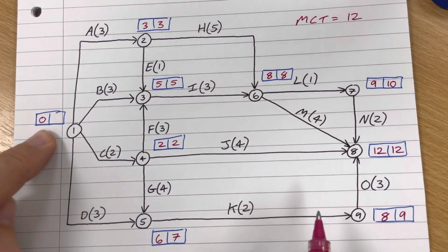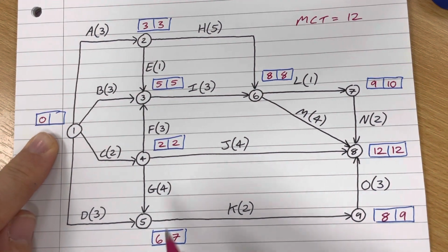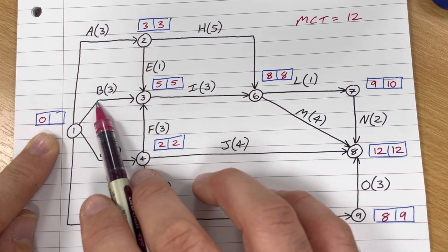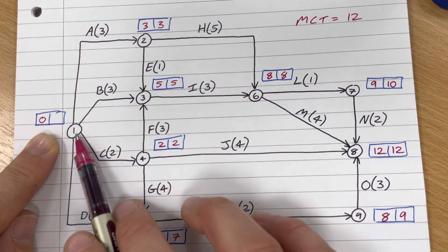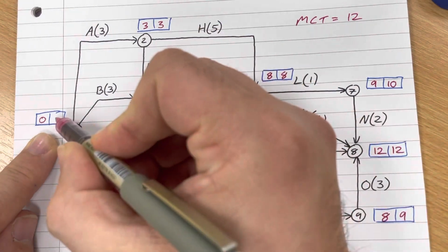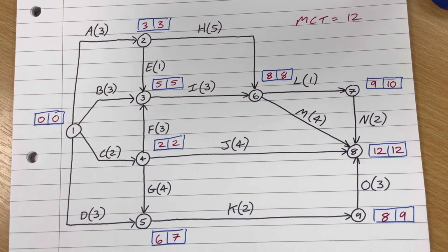And then at the start node, it should be a 0, but don't just write it. Do check it. I've got 4 inputs to check. 3 minus 3 is 0. 5 minus 3 is 2. 2 minus 2 is 0, and 7 minus 3 is 4. So the smallest of those, which occurred twice, is the number 0. Okay, so that completes the backward pass of the algorithm.